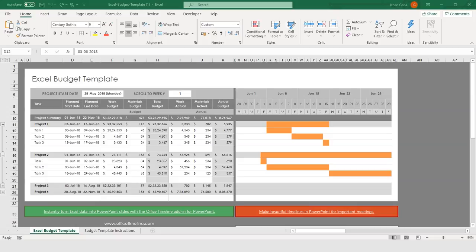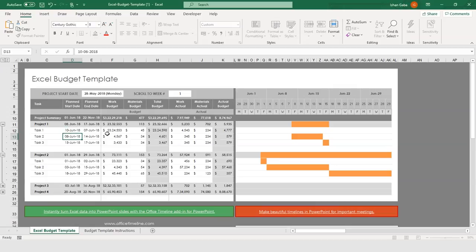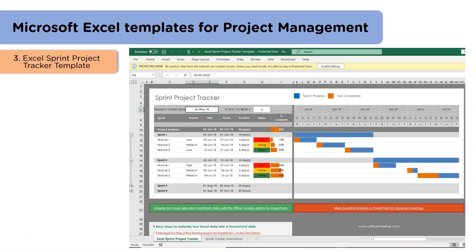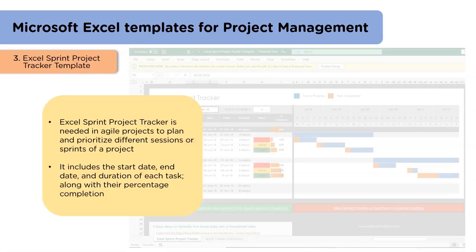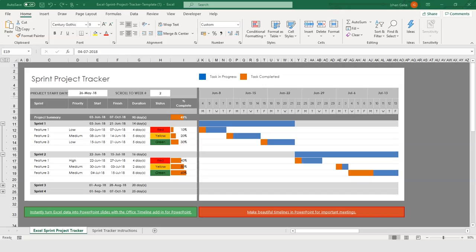We can download this template from office-timeline.com. The Gantt chart towards the right is in accordance with the dates towards the left. If we change the start date for Task 1 to 10th June, we can see the fluctuation in the Gantt chart. So this is how we can use this template directly. The third template is the Excel Sprint Project Tracker Template. This template is used majorly in Agile projects, where the project is made in several sprints or sessions. It includes the start date, end date, and duration of each task, and we can also see the percentage completed of each task. We can see the Gantt chart towards the right and the data towards the left — if we change the start date in Sprint 2 Feature 3 to July 2nd, we can see the Gantt chart changing. This is how we can use this template to track our sessions.